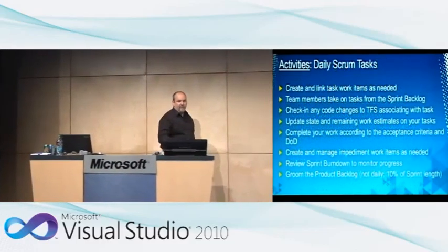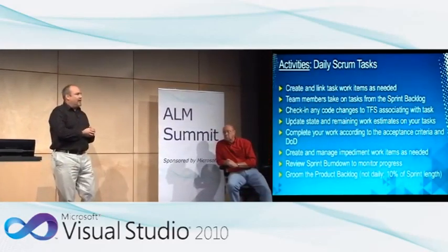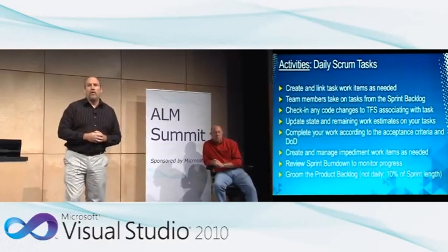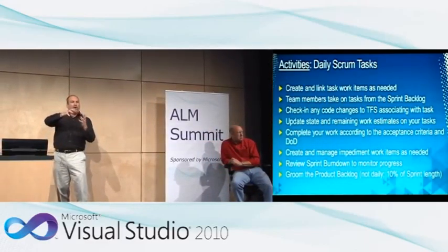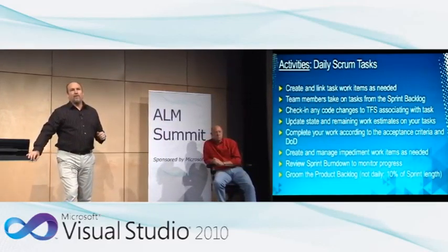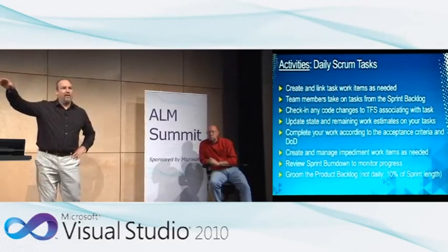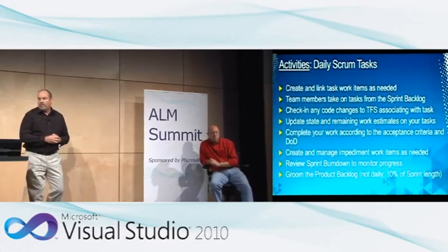So last couple things here. Daily, update the work items as you need to. You're not going to know everything during sprint planning that you've got to do to deliver that increment. Stuff will emerge. You might get better at that and build larger tasks at first that you break down later. So your initial hours estimates, don't make the burn down look like it's doing the funky chicken. You'll get better at that, and you'll be able to use that as more of a predictive tool.